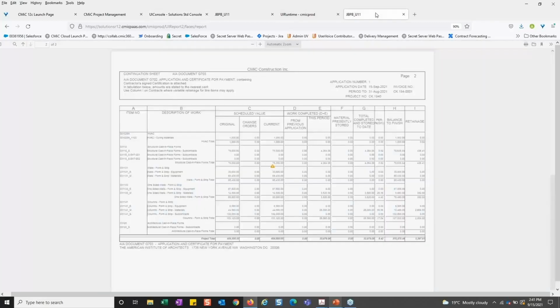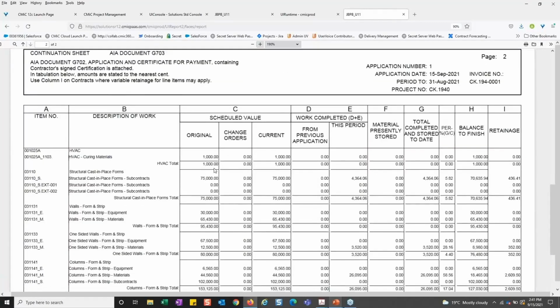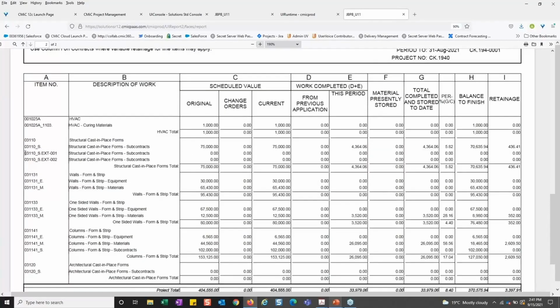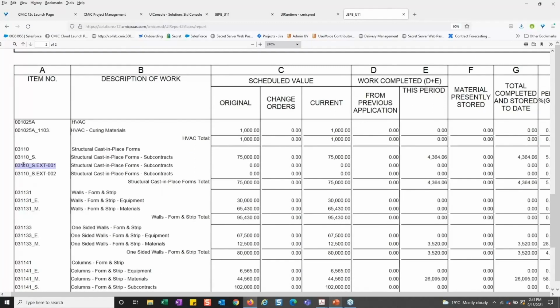So again, we've got cost code, category, and then PCI code, which is what's going to generate our build codes for us. And in the report I had up earlier, and again, we'll go through this so that you can see, notice when I scroll down here to this section where I have it highlighted, maybe I'll zoom in a little bit more. This is an example of after I've done the appropriate setup, I've posted the PCI, I've flowed it into the billing, and I'm actually producing it. I can see in this case the cost code, the category, so the S, and then I can see my PCI code as well. So my build code in this case, again, is cost code, category, and PCI code.